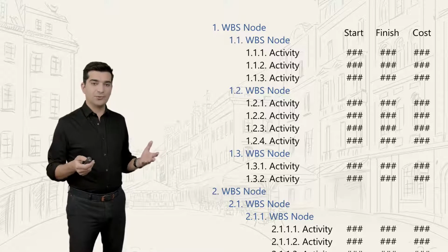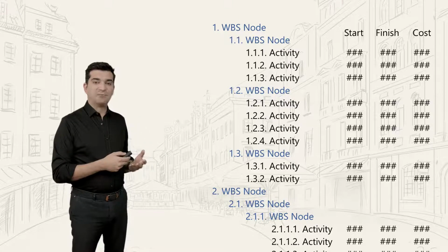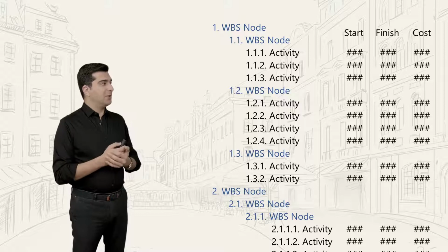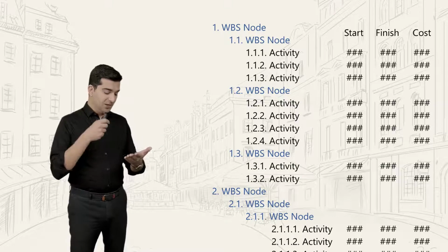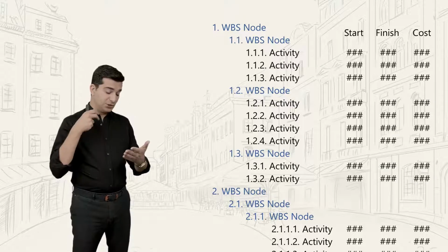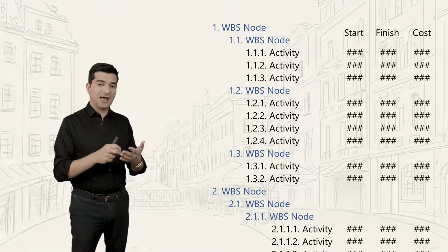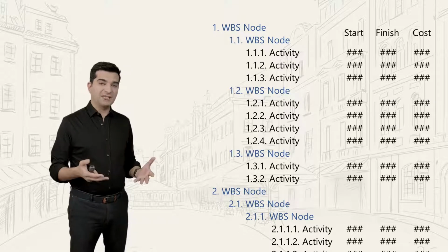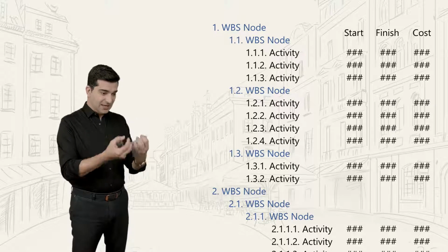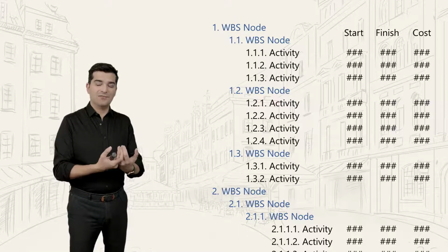Now, the idea is that we can create baselines for anything, and practically we do that. Any document that you create will have baselines. For example, think about your project charter, okay? The first time that you create a project charter and someone signs and approves it, you can consider that a baseline. It is approved. It's an important point in time for that document.